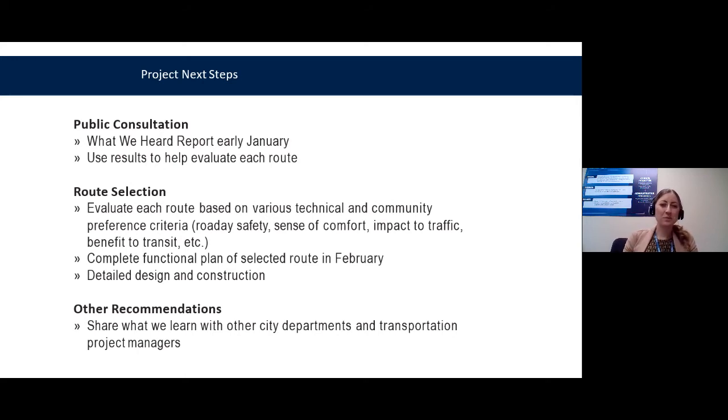So I'm just going to chat through some next steps before we get to our final discussion period about the project in general. Just to give you a sense of what's coming up in the next few months for the Dartmouth North project, we're going to be wrapping up consultation for this project on December 19th. So in about 3 weeks from now, we'll be finished. And then we're going to be putting together, as we did last time, the survey data, the interview data, the stakeholder meeting results, all of the different engagements that we're doing. We're going to compile all of that feedback into a what we heard report.